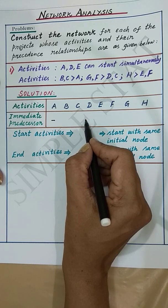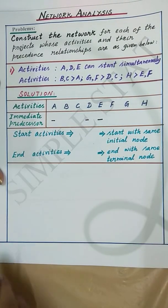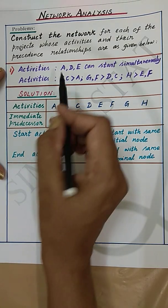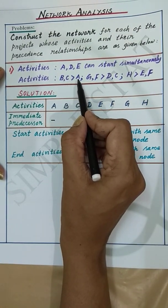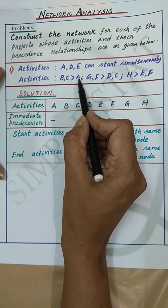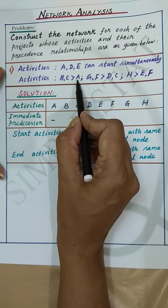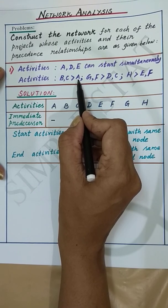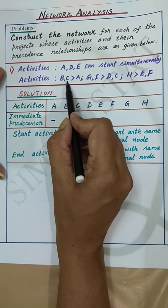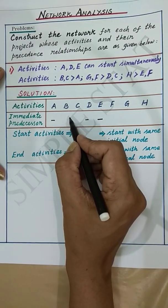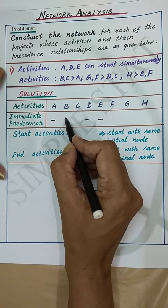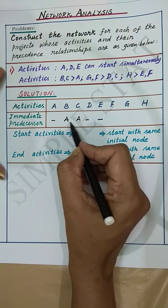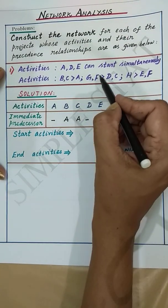A, D, and E do not have any predecessors. Next, B and C follow A — this means that activities B and C are the successors of activity A, or we can say that A is the predecessor for activities B and C. So for activities B and C, A is the predecessor.